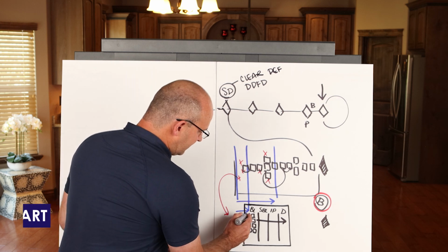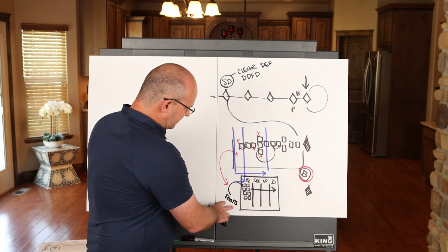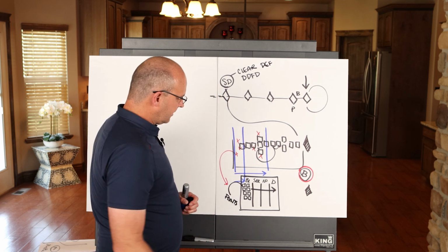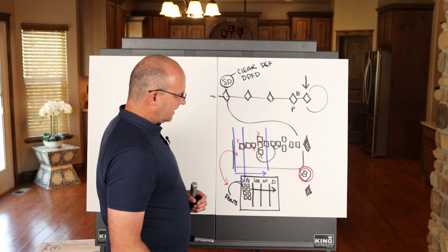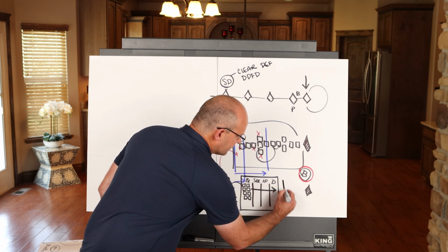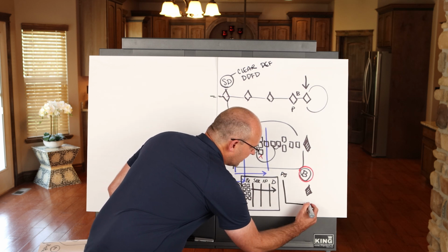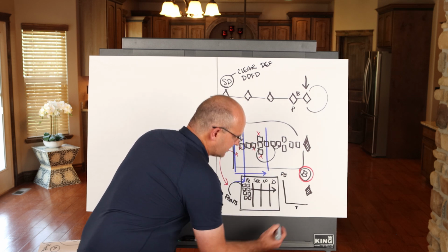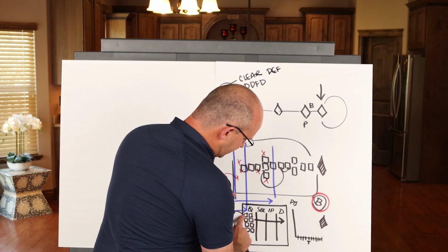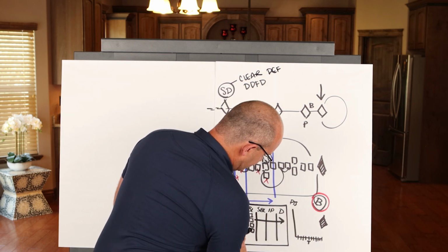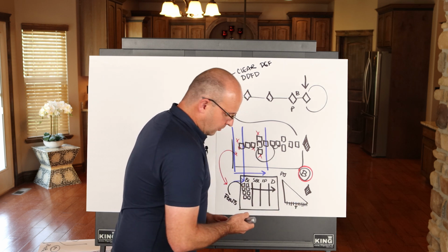Each of these activities have points, okay? And it's based on the Fibonacci scale, and it represents the level of effort of each of those tags. And so in your Burndown chart, if you have the number of points and you have time over here in this direction, and you know how many weeks it's going to take till it's done, and you know how much level of effort you have here to do, you can create a Burndown chart, and then every week when you,